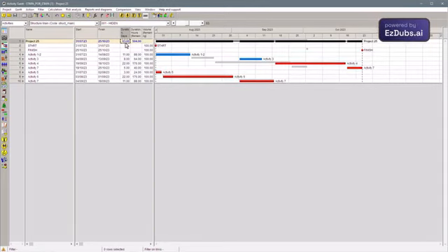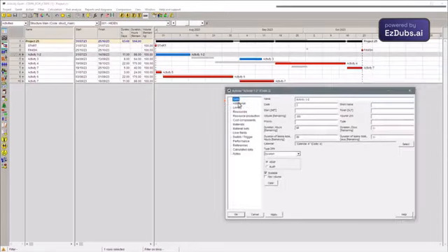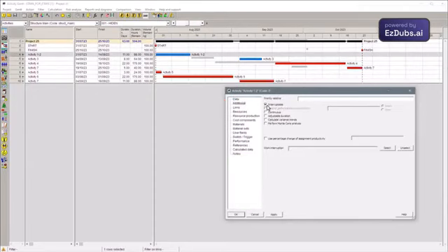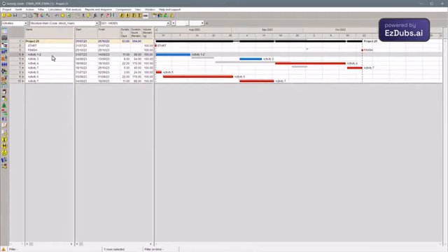Well, here we have to discuss the two resources that we mentioned that were raised in our internal debates. The first feature would be the interruptible. Interruptible is when you have an activity that has the attribute, among others, of being interruptible. If you don't have the resource or if you don't have the conditions, the activity can be interrupted, giving way to another activity. So, if I put this interruptible here in activity 1, 2 and ask it to calculate, there is no difference in our planning.